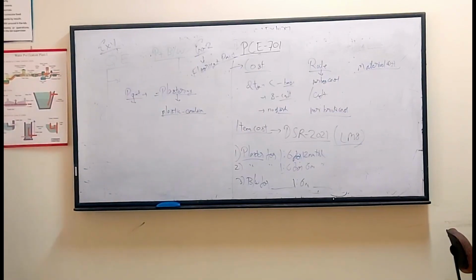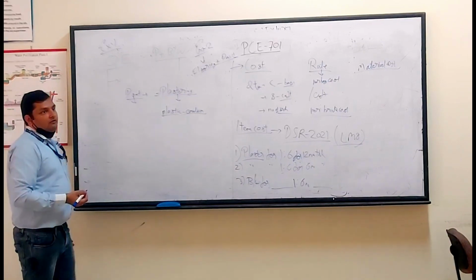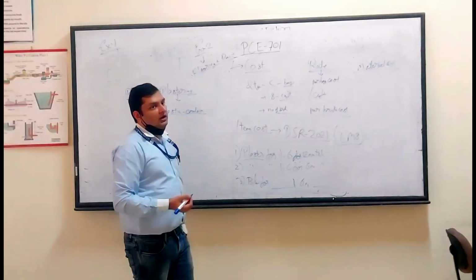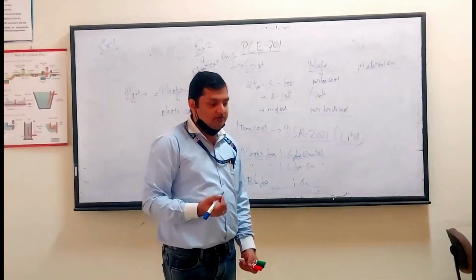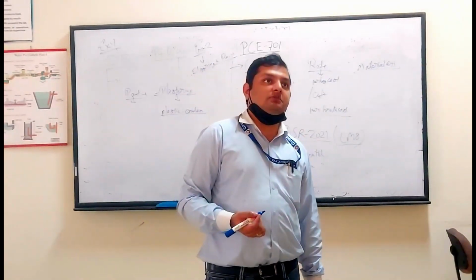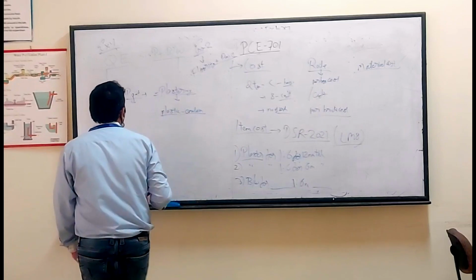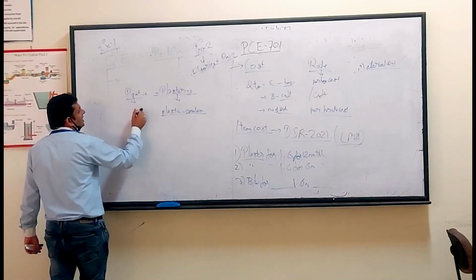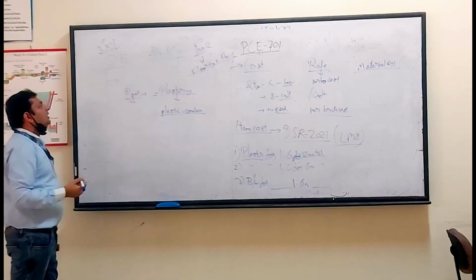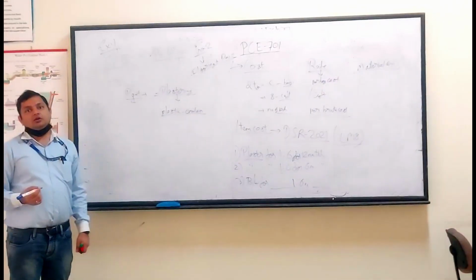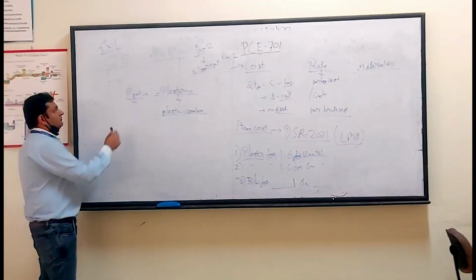Each paint item will have a coverage per square meter of the area. How much liter will be consumed? This is an average for each paint. Different brands have different estimates, so you will not be able to calculate the quantity of the paint. Just directly get the painting area, get the item from the DSR and get the cost including the labor. That is your first work.